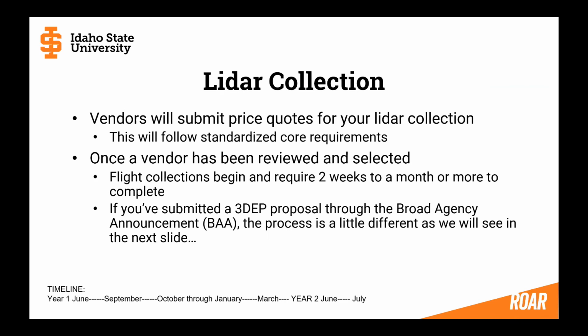For this LiDAR collection process here, again, the vendors are going to submit price quotes for your LiDAR collection, and this follows more or less standardized core requirements. A lot of this is going to be handled by your point of contact, but you won't be blind to it, and you probably need to watch what's going on with that. Once a vendor has been reviewed and selected, those flight collections can begin, and they require at least 2 weeks to a month or more to complete the data collection. Now, if you've submitted a 3-step proposal through that broad agency announcement, the process is a little bit different, as you're going to see in the next slide.